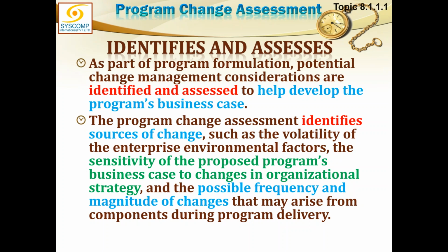Even if the program management plan was created, that also will go through the progressive elaboration cycle, and that change in the program management plan cannot be brought in without a proper change control mechanism. So change management considerations are to be identified right from the outset, and they must be assessed to help develop the business case, later on the charter, and ultimately the program management plan.